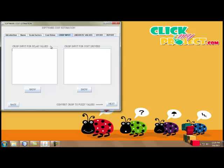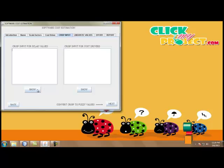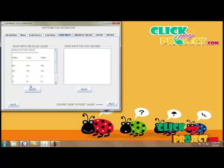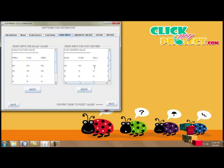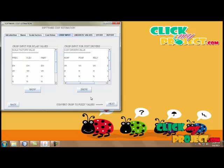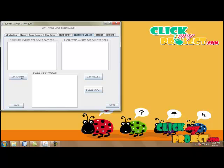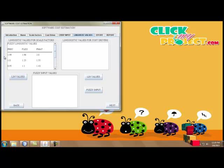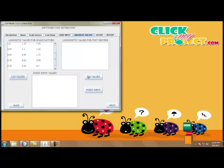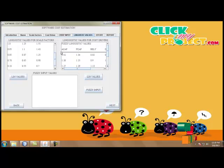Here are the crisp inputs. Our inputs are categorized as low, high, nominal, and very high. This is called crisp input. The crisp inputs are shown for the scale factors and the cost drivers. When the crisp inputs are converted into fuzzy values we move to the next process — the linguistic values. The scale factor crisp inputs are converted into linguistic values for fuzzy classification purposes. The high, nominal, and very high crisp inputs are converted into fuzzy rule values based on the FL COCOMO 2 model. Linguistic values are also generated for the cost drivers.